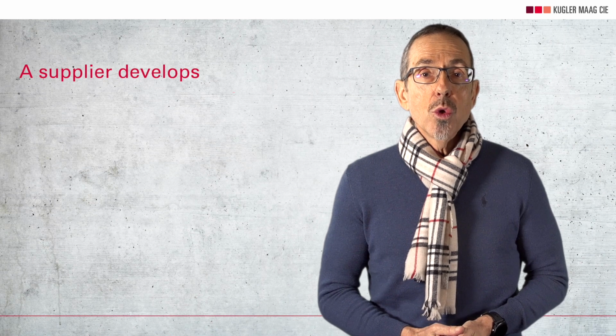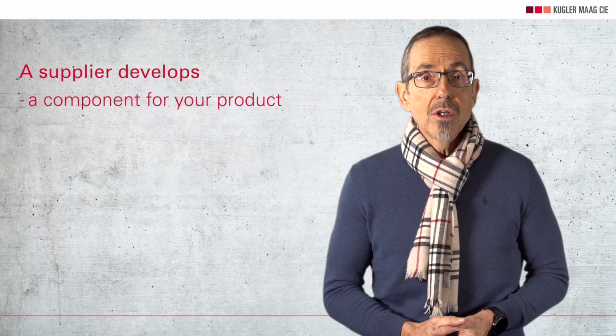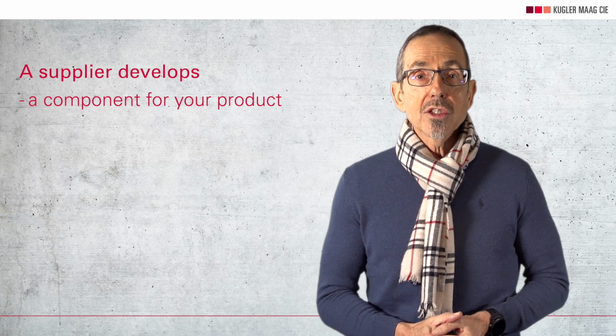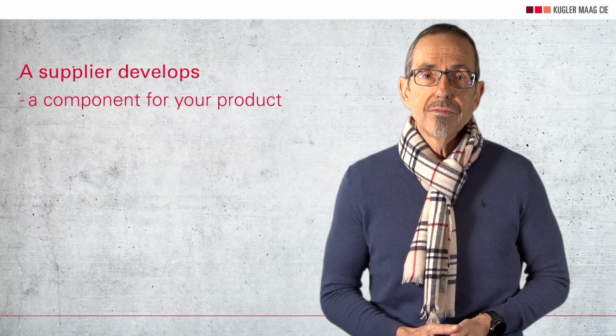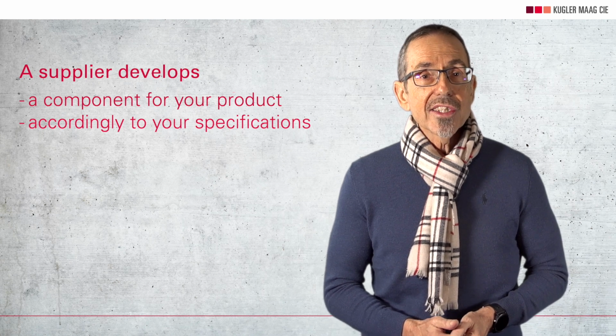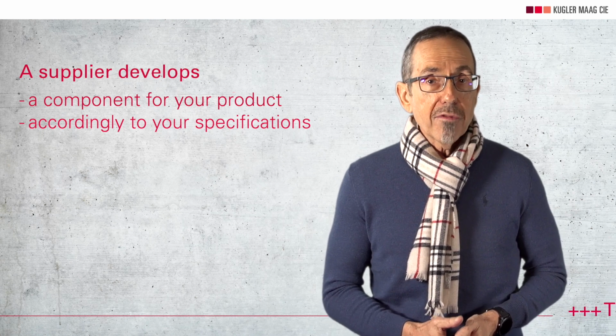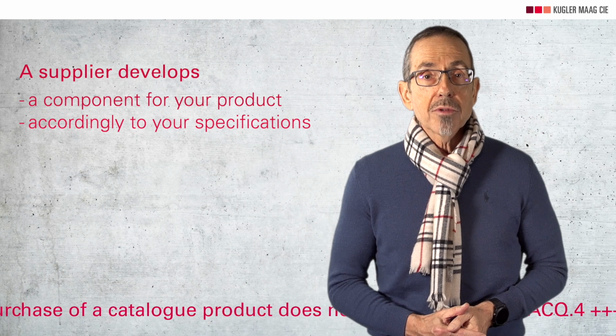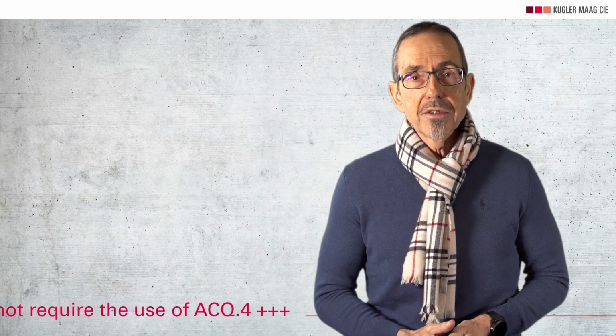By the way, what are suppliers in this context? Well, there is no official binding definition for what kind of suppliers we use this process. We focus on suppliers who develop a component of our product, typically a software component or a combination of hardware and software, such as a sensor. The component should be developed according to our specification, as this requires considerable management effort. In contrast, the purchase of commercial off-the-shelf products does not require much management.